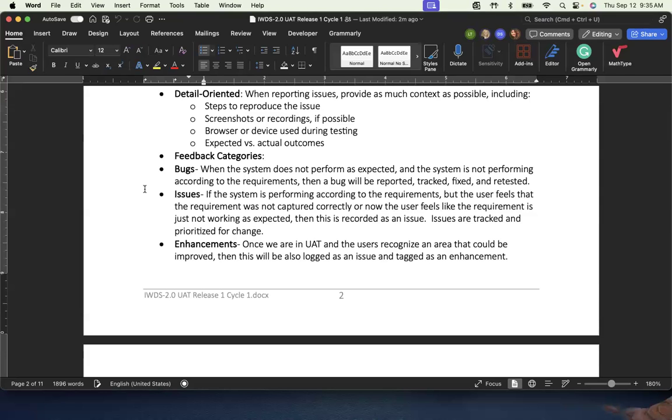We're not saying we're not going to do them, tomorrow or the next day, but we have to make sure we get a product out to you on our scheduled timeline. If we start enhancing it too much, then the scope gets out of hand and we can't give you that MVP, that minimum viable product, release one that takes care of the standard functionality. But we want them reported.